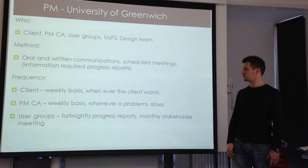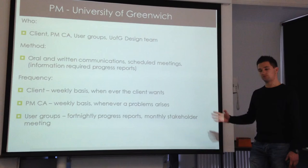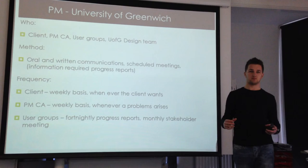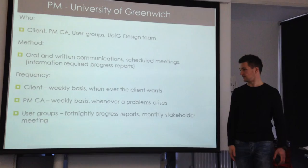User groups — so the end users, students, staff, stakeholders. Fortnightly progress reports would be quite nice. You can send that out to everybody and have a monthly stakeholder meeting. Have everyone come together, a representative of each group, and have a meeting — so this is what's happening with the project, any comebacks, that sort of stuff.